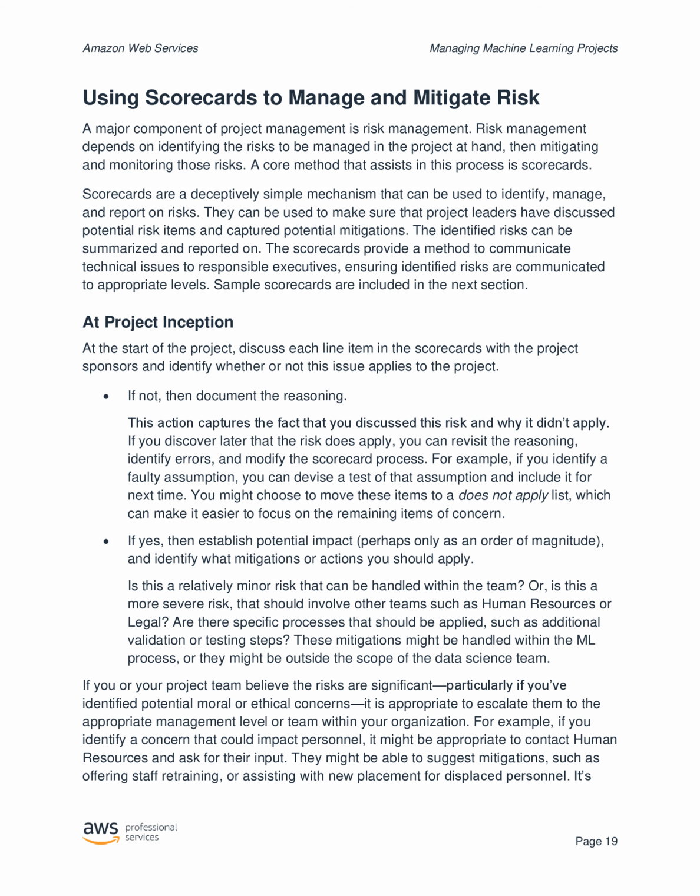At project inception, at the start of the project, discuss each line item in the scorecards with the project sponsors and identify whether or not this issue applies to the project. If not, then document the reasoning. This action captures the fact that you discussed this risk and why it didn't apply. If you discover later that the risk does apply, you can revisit the reasoning, identify errors, and modify the scorecard